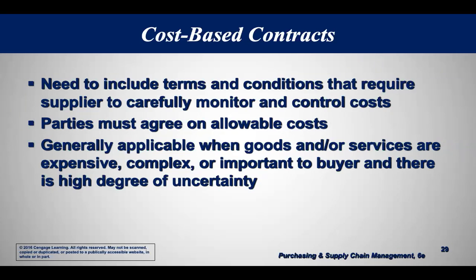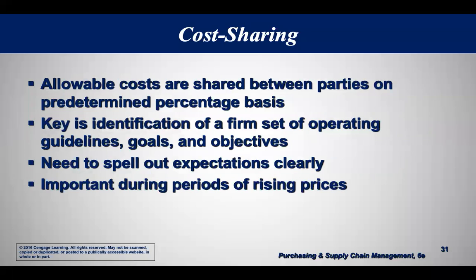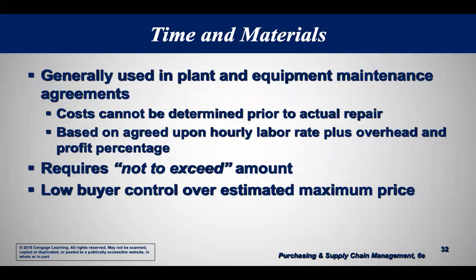They're quite often done with cost-based contracts. So a cost-based contract can have things added to it, okay? Some sort of a fee based on timing or quality or whatever, okay? You can have cost sharing, you know, 80-20, 50-50, etc. But you need to define all that at the beginning.